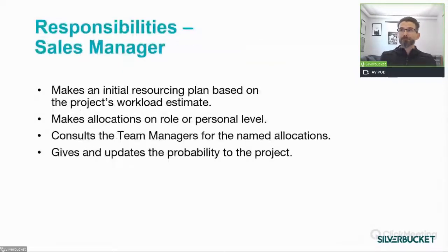First of all, about the responsibilities of the sales managers. They are making an initial resourcing plan for their own opportunities, possible projects in their own sales pipeline. They need to roughly estimate the workload of the potential projects. So how many hours would the project require?